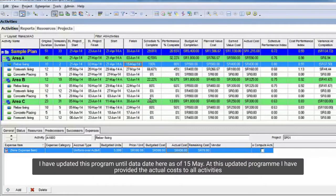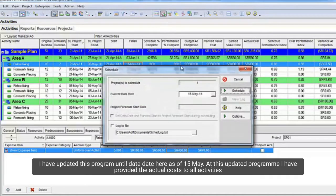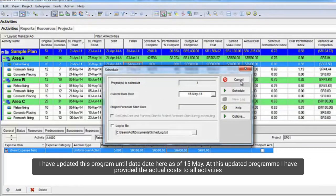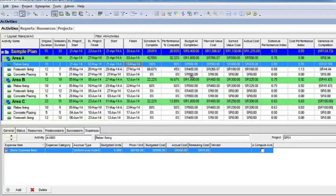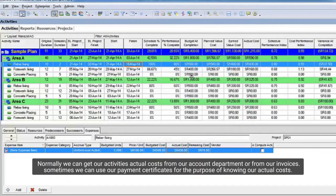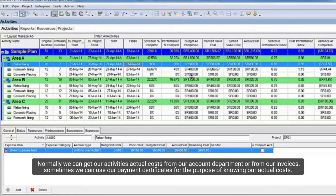I have updated this program until data date here as of May 15. At this updated program I have provided the actual costs to all activities. Normally we can get our activities actual costs from our account department or from our invoices. Sometimes we can use our payment certificates for the purpose of knowing our actual costs.